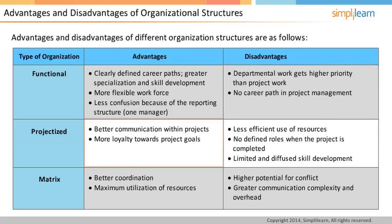In addition, there is no career path in project management, which leads to lower interest in projects. In the case of the projectized organization, one of the clear advantages is better communication within the projects. Since project work is the only work team members are doing, it also leads to loyalty towards the project goals. The disadvantage is the inefficient use of resources because every project team has their own support function, which might lead to the duplication of effort. It also leads to resources being left with no work since their roles are over once the project is completed. It also hampers skill development because the project requirements dictate what kind of work team members perform.